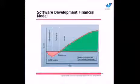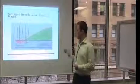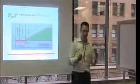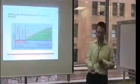Good reasons for that. This is a waterfall project, and this is basically the go live date for the waterfall release project phase. And what happens is it usually takes about the same amount of time, or 1.5 times, to break even. And profit is only realised after, if this was a 1-year project, or a development project, after about 2 years. And the biggest problem with that is that after 2 years, the product's entirely changed and they want something completely different. So the profit margin actually reduces. So we need to be able to realise profit a little bit better than we've done in the past.